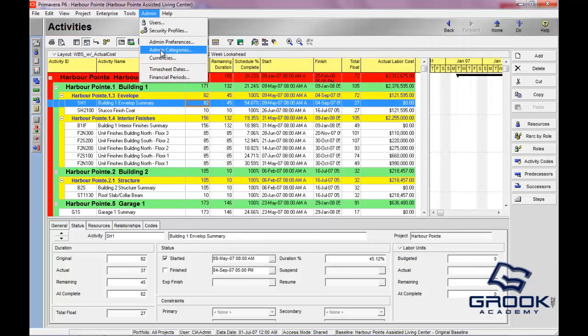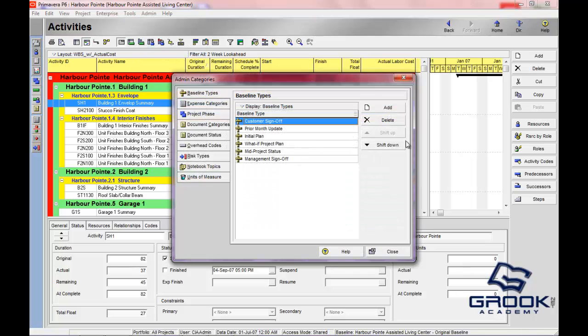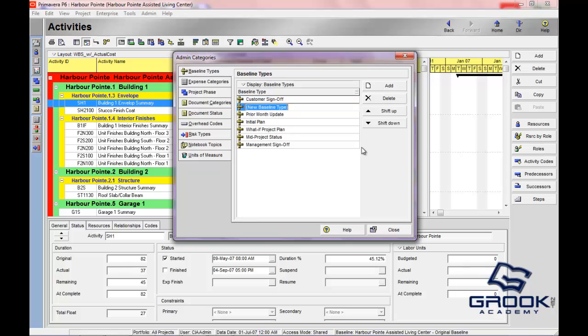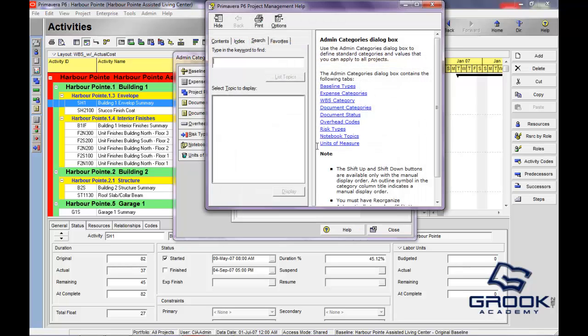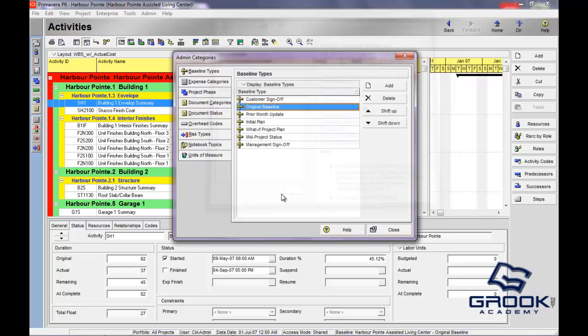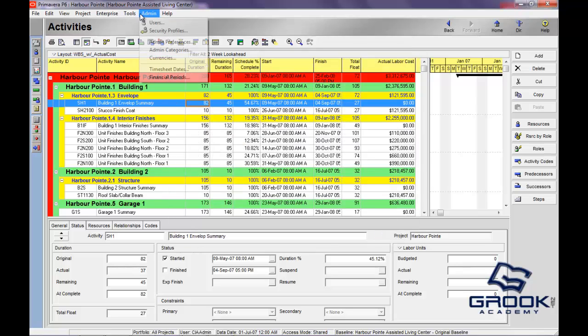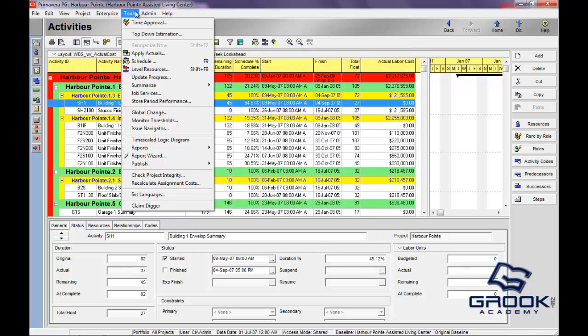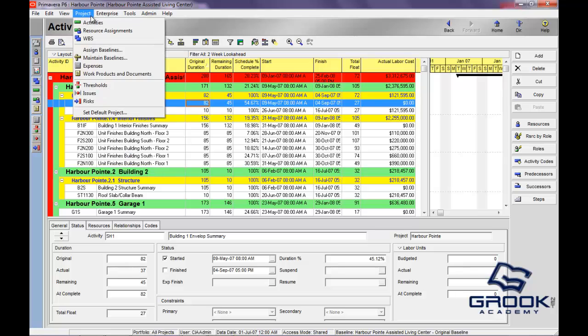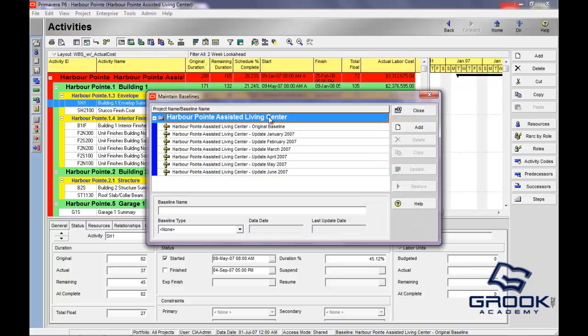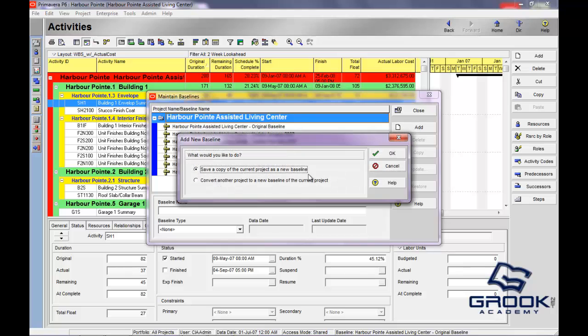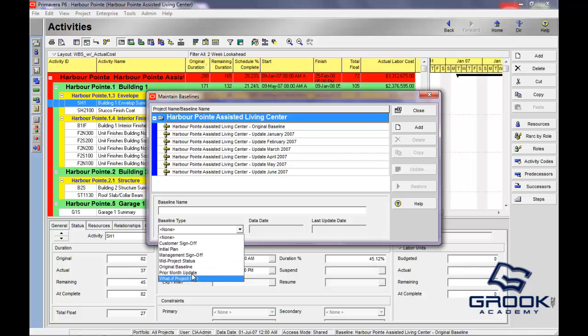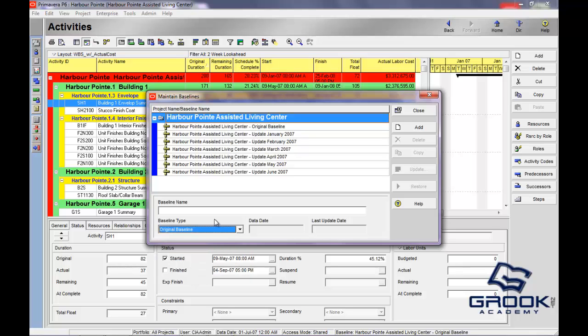The second thing that we're going to discuss is admin categories. This is where you really start to get the customization in Primavera. Here you're able to determine baseline types. We could create a brand new one that was original baseline. So now when you go to add a baseline to a project, you can go to manage baselines, and now that option would be there. When you added one, you would have the option of choosing a type, and baseline type would be here, and now you'll see original baseline.